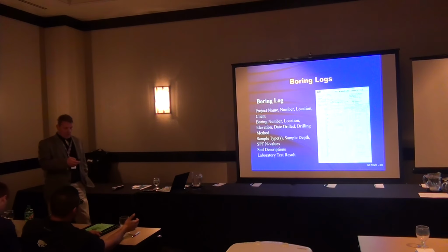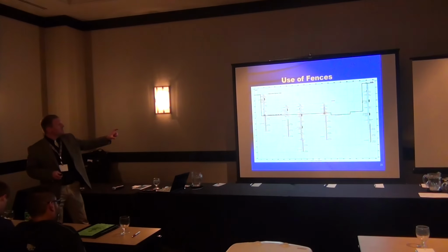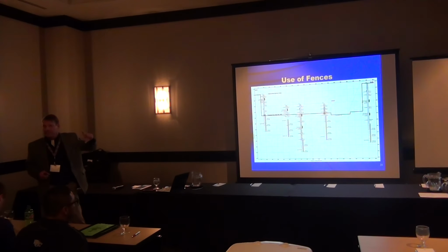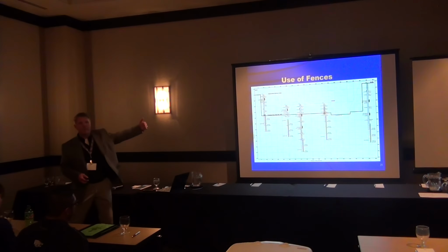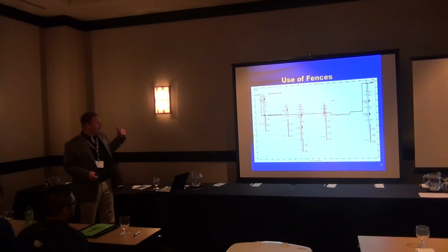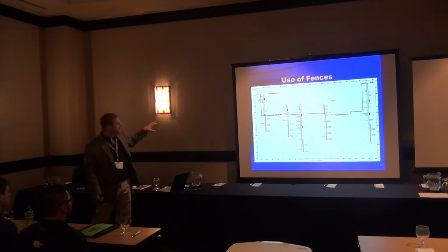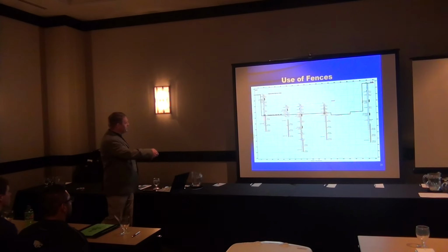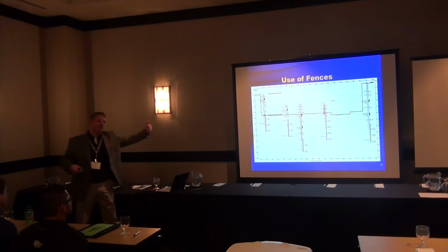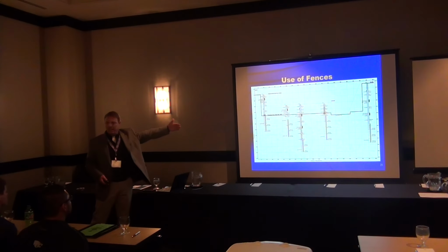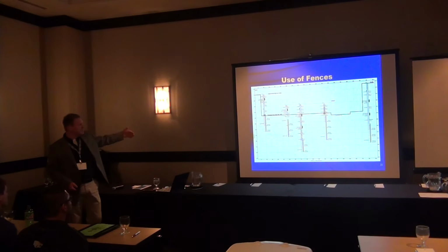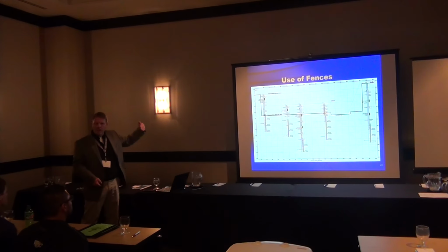All right, so we're getting close to the end here. This is another tool that you'll frequently see in the back of the geotechnical report. It's called a fence diagram, and it simply lines up all the boring logs. One of the things we like to do with this visually to help people understand is put this black line here, a proposed finished floor slab, as we know it when we issue the report. So we can pictorially show you what you're going to have to be excavating and what you're likely to be sitting on from a bearing capacity standpoint on your site.